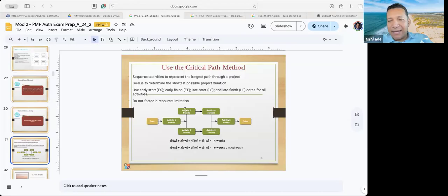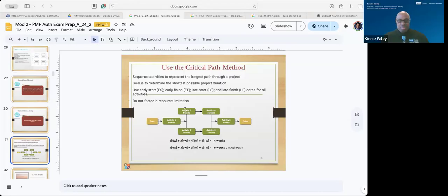That sit around time is also known as slack. That's your slack time. That's the extra amount of time that Kelly has. Question: why is she waiting around? Because she's done. Couldn't activity 4 get started?